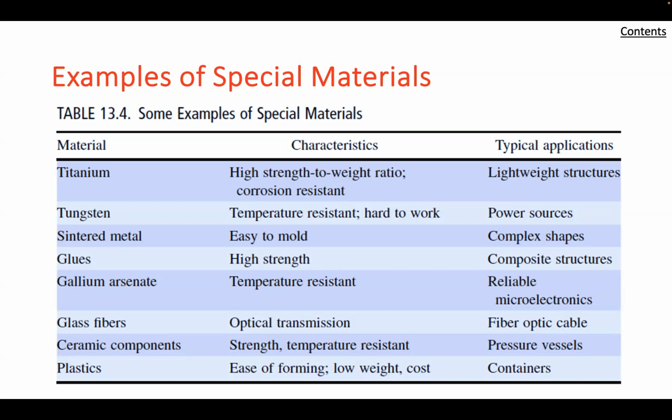Software components should be addressed similarly. Each component is assessed for complexity, and a risk strategy is developed and implemented. Particularly complex components, especially those controlling systems hardware elements, may necessitate the design and testing of many system software components in prototype form during the phase of an effort.